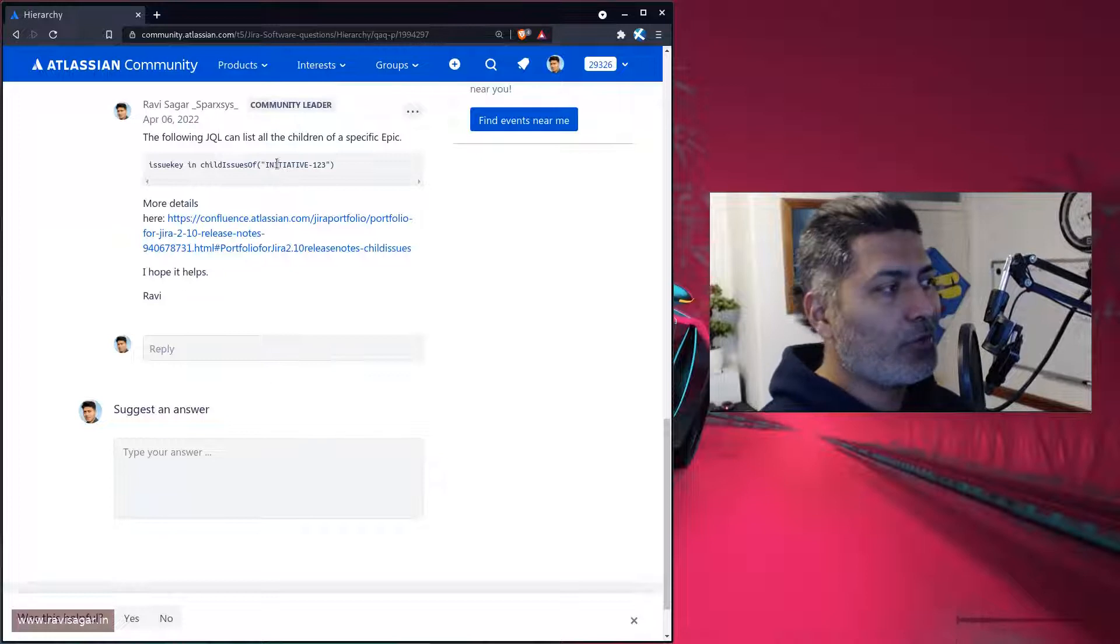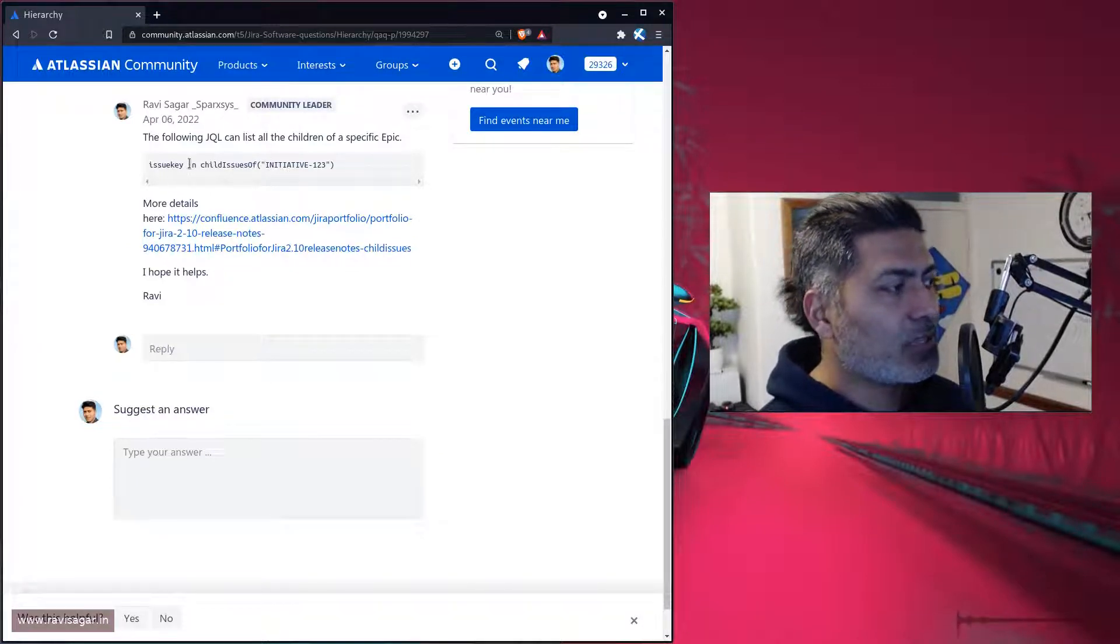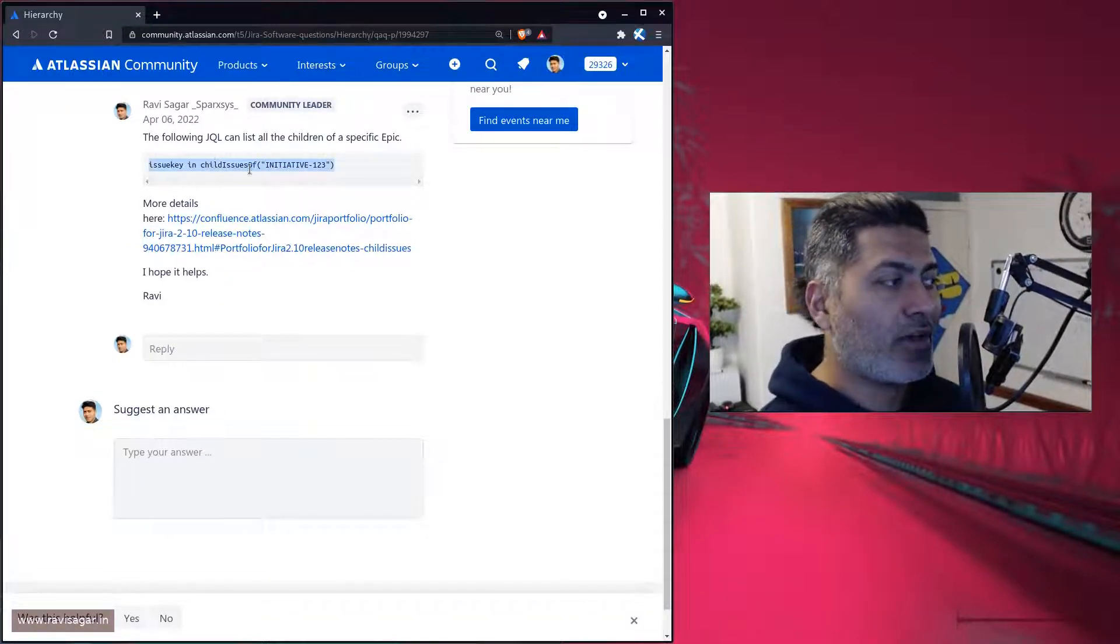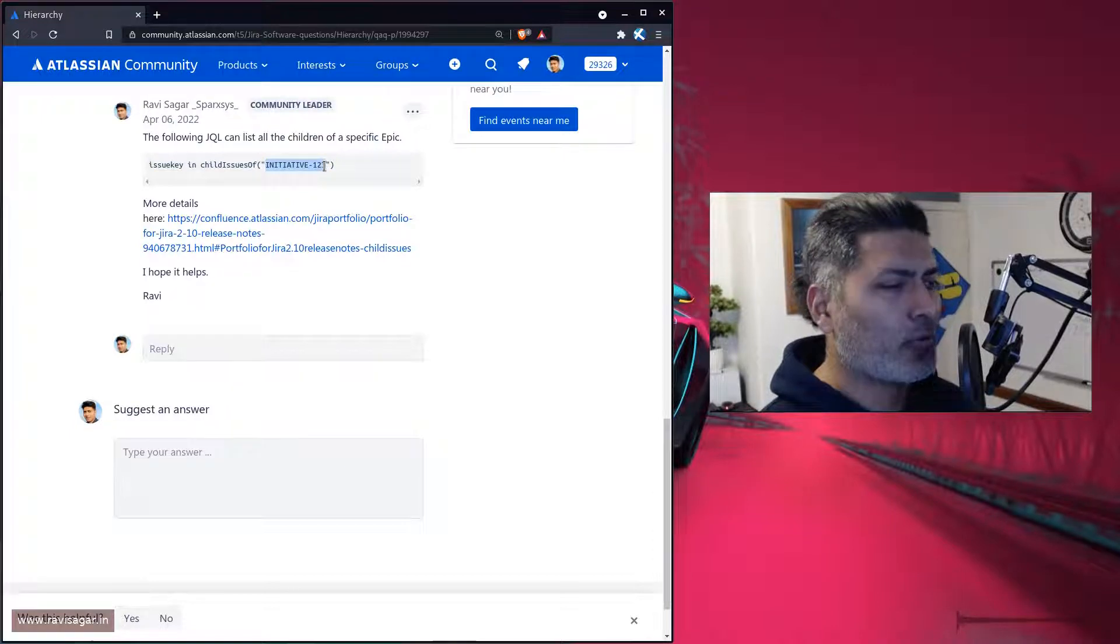If you have portfolio, you can use something like 'issue key in childIssuesOf' and then you can type in the initiative name. Of course, it is hard coded, but it works.